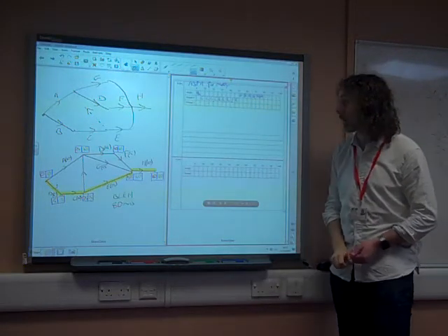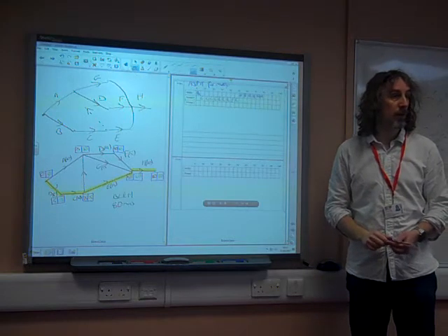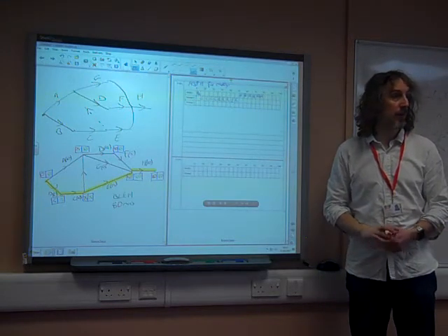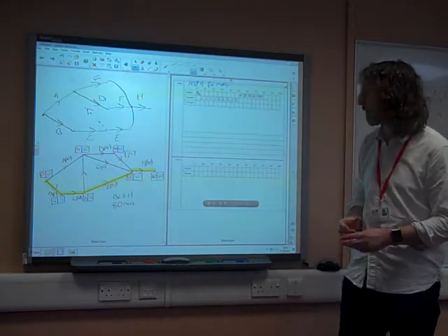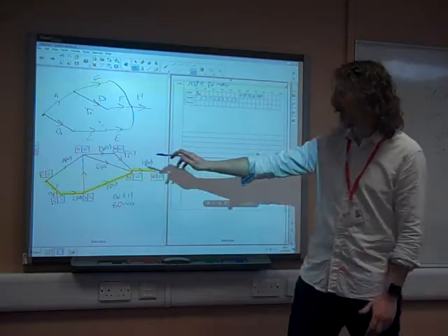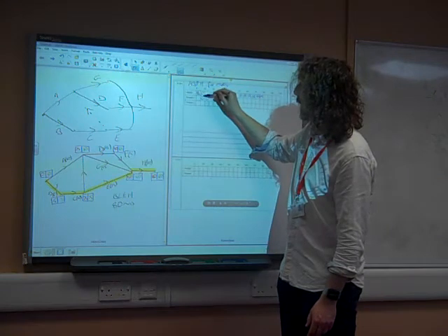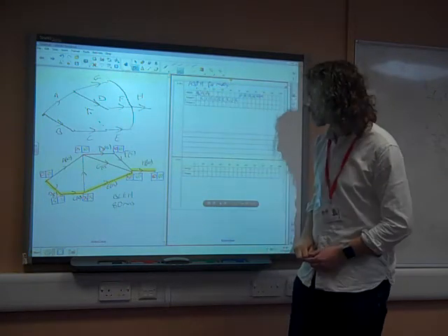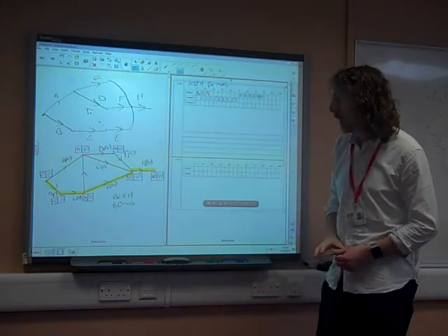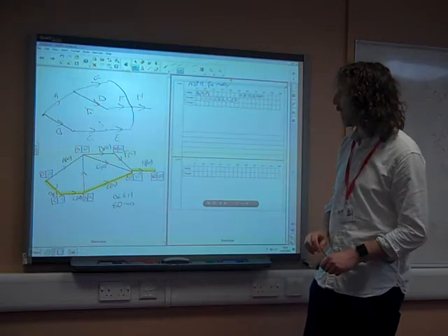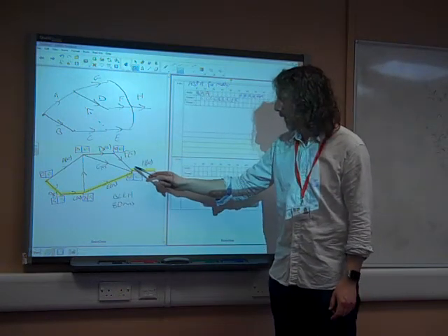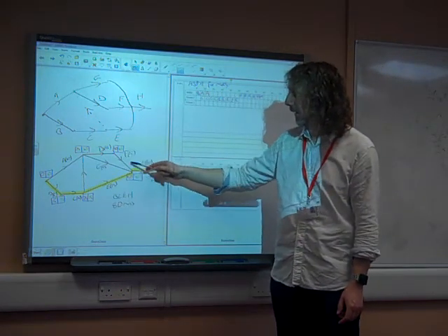Okay, so that has got my critical path sorted. All I need to do now is to fit the other activities in around that. Let's have A starting as early as it possibly can. So let's put A, which was non-critical, in straight after B. Molly had to do that, remember. Molly also has to do F. Now F just has to take place at this point here.